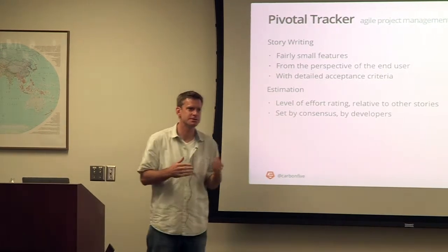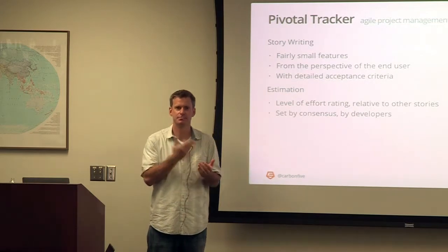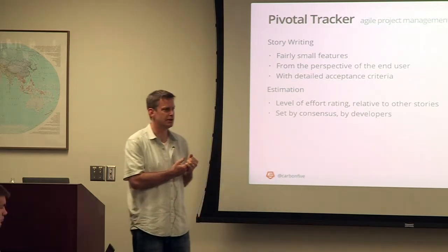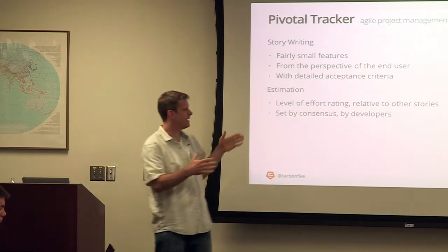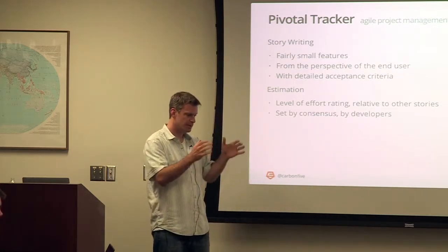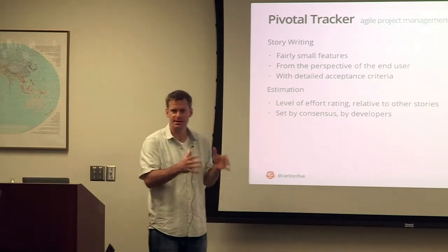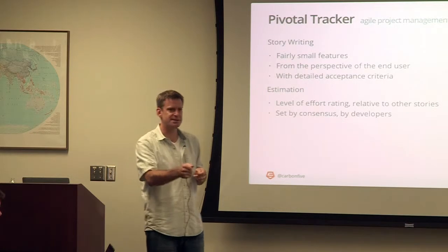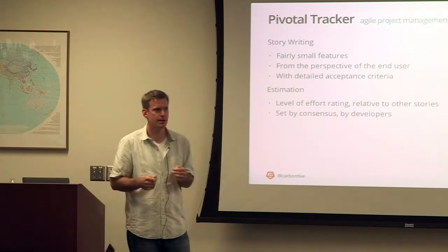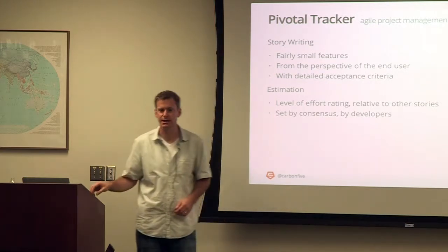And that's super useful. This is not a hand-wavy estimation. This is a metrics-based estimation of when stuff is going to get done. And if you can define your milestones and your releases by, as soon as these top 10 features are done and accepted, then I'm ready to release an alpha, or I'm ready to try and find our first 10 customers or something like that.